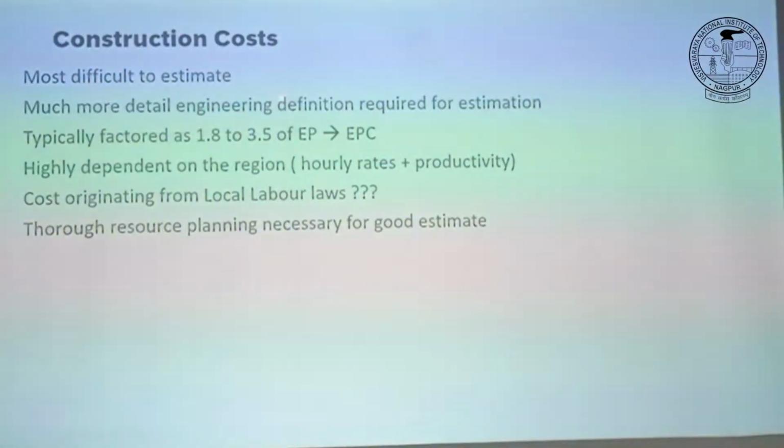Right? It can also depend heavily on the location. You could imagine hourly rate. In India it could be 50 euro per hour, somewhere it could be 200 euros per hour. So your construction cost can be quite different. And it's not only hourly rate, but it's also productivity.